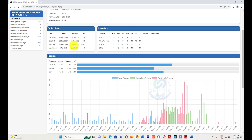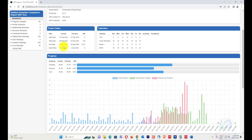In my previous schedule the finish date was 15 November 2025, but in my current schedule the finish date is 17 December 2025. Also note the must-finish-by date — some people change this date just to reduce float, but that's incorrect. People should know what the proper must-finish-by date of the project should be. The duration between the two updates is 59 days.